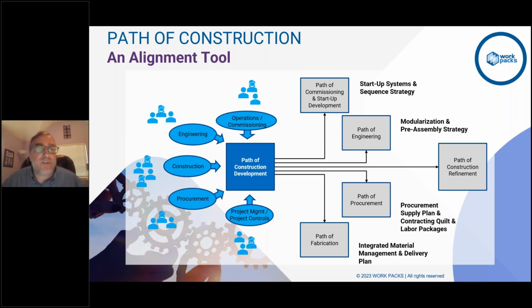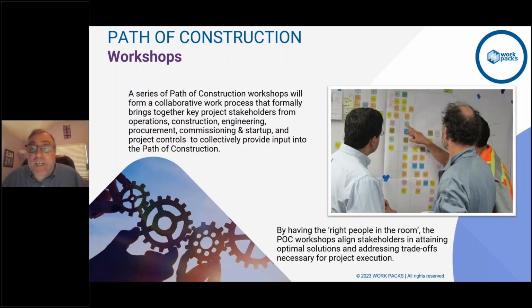And then use this as an alignment tool, and to have the interactive planning sessions along these lines, everybody contributing to the path of construction and having alignment along those lines, right? So everybody's seen the sticky notes and the exercises in terms of having an interactive planning process, getting the right people in the room to have the POC workshops and get alignment, right? And start making those trade-offs in terms of what's going to be necessary in order to deliver. Here's the path, and then we might need to do things differently based off of long lead items, etc. This needs to occur, etc. Thinking that through in a big room type of environment in interactive planning sessions.